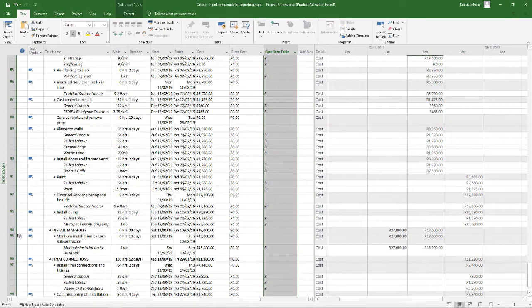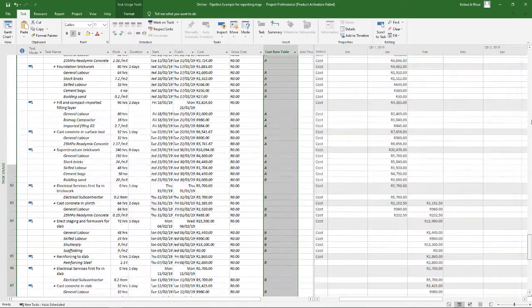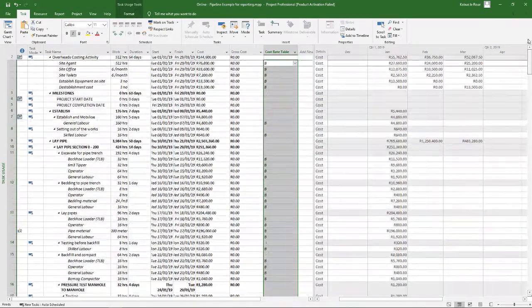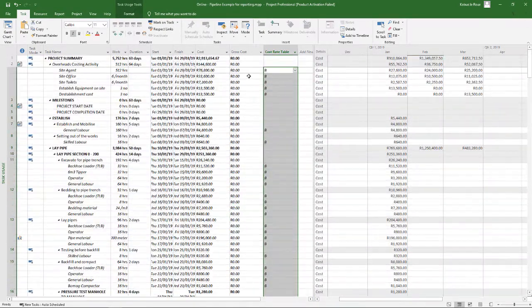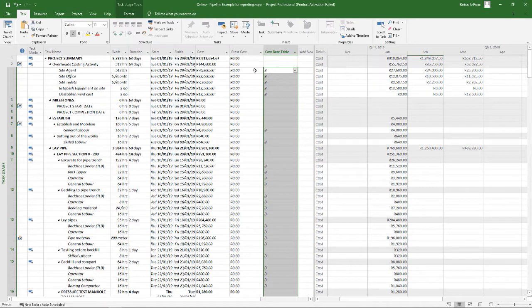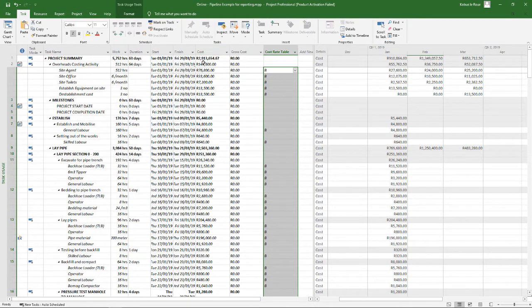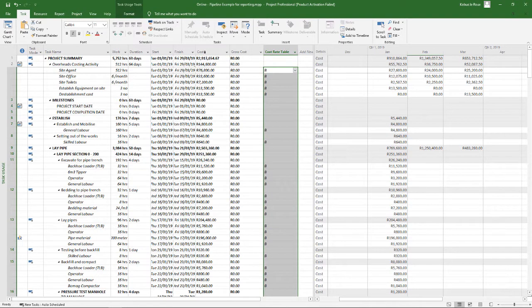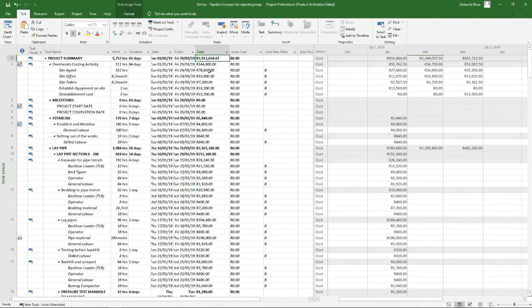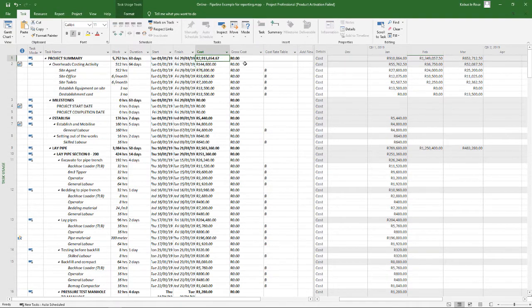And now you'll see everything has changed to the B rate now. So my cost is now 2.9 million. So the actual cost, my allowable cost was 2.5. If I add my B rates, which is now everything with profit, then it goes to 2.9.